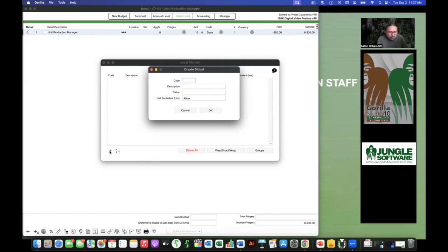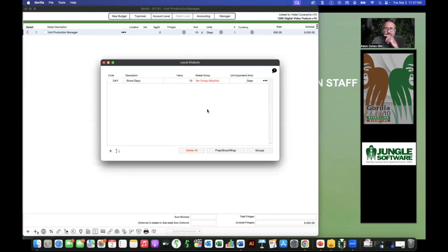So let's just call it days. I could call it DAY if I want, or a D, whatever I want. And I'm going to call it shoot days, for description. All right, we're going to say 10. And it's a day unit, so I could put in days, right? Now, what I've done is I've literally just created a line that says whenever I put a shoot days global somewhere on the line, I'm going to show you how to do that, it will also enter 10 for that.